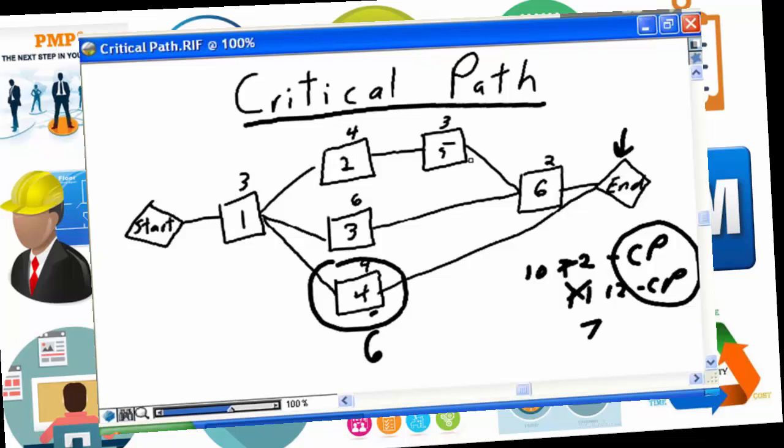To understand which tasks are on the near critical path, your project management software will also do a calculation for you, which will determine a value called slack. And the closer the slack value for each task is to 0, because tasks on the critical path will have a slack of 0, the closer to 0 the slack for a task is. In this original instance, task 3 would have a slack of only 1, means they're on the near critical path, and the farther the slack is, in this case the slack would be 5, the difference from 7 to 12, identifies that they are not near the critical path and therefore need to be managed appropriately.